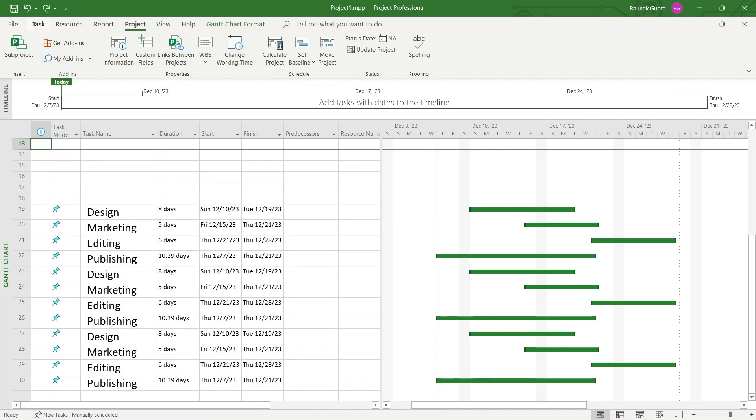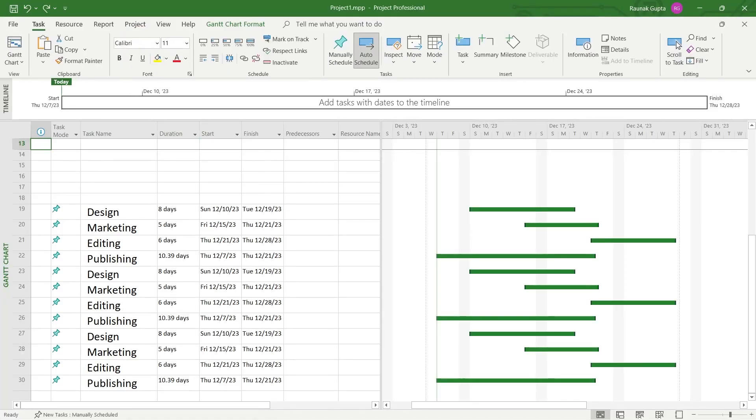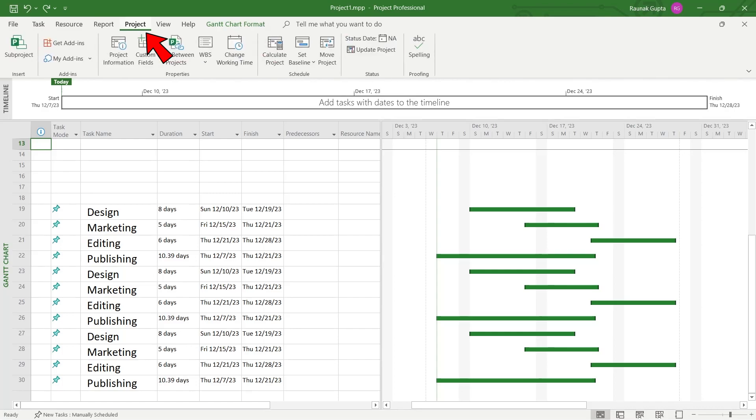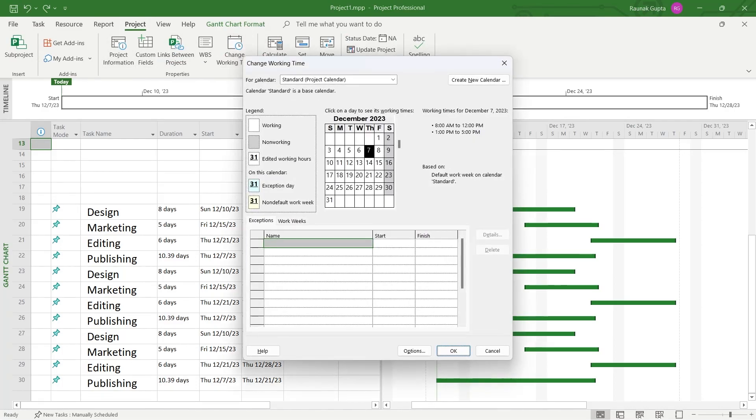In order to change the working days, what you're going to do is simply click on the Project option at the top. Now we have this Change Working Time option. Click on it and this will open up this Change Working Time menu.